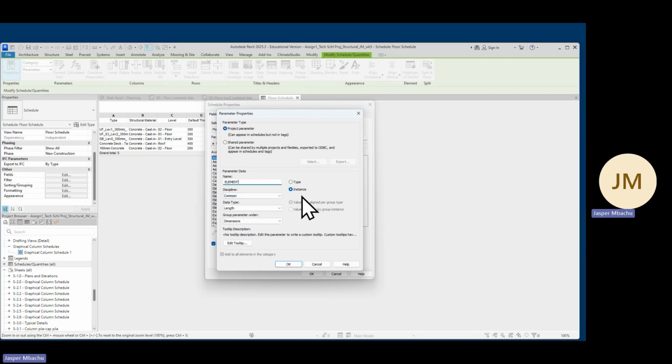Element. And this element, we want it to be type. So it's a type parameter. So if we had designed our type parameter to indicate all UFs, then when we make one change, when we type UF in one aspect, it will migrate to the other rows of slabs that are of interest, as suspended floors.